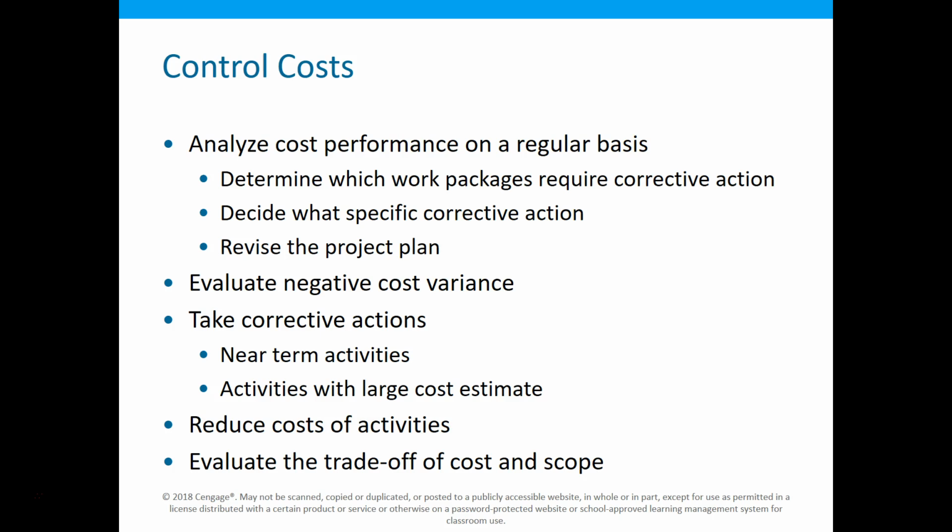So if I'm behind on costs on a highway construction project, does changing the supplier of the toilet paper in the porta pots have an effect on the project? I need to look at those big scale actions. So what is the big scale action that I can look at? Maybe on a road highway project, I can go, hey, if I renegotiate my rental contract for all this equipment really quickly, maybe I can correct that project.